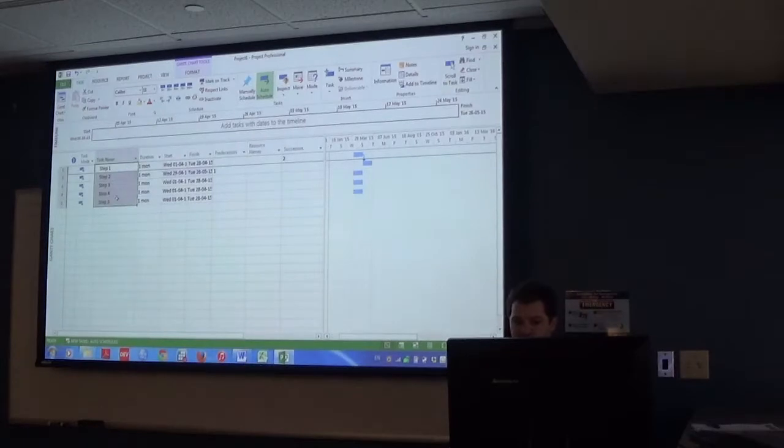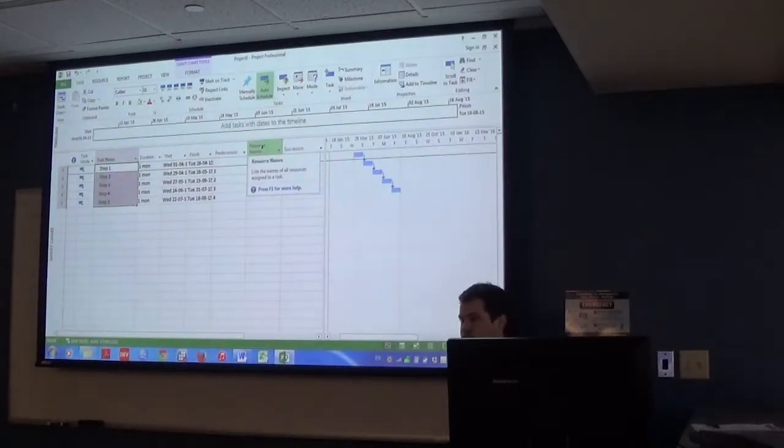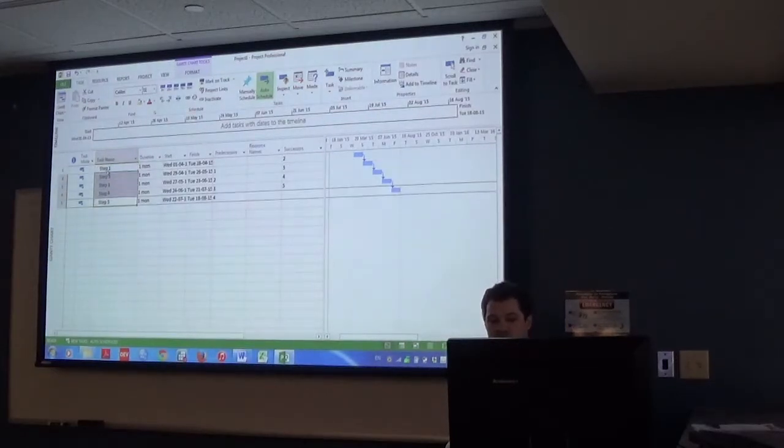And just to show you, you can mass edit. So I'm going to remove that link, and then I'm going to link all these. Did you see that? So I highlighted all of them, and I said I want those to be linked. All right, nice. What tab? You need to have your task ribbon open at the top, and I want you to highlight multiple tasks, and then click this link right here. Link the selected tasks.